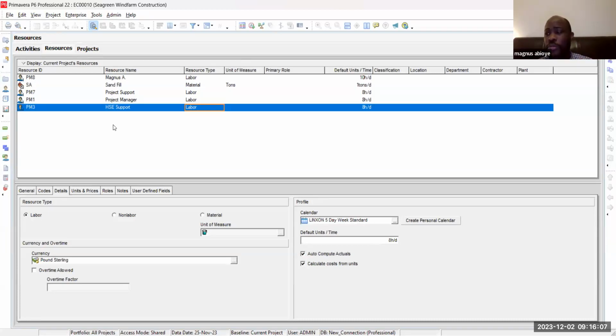If I just want to put costs, say 50,000 lump sum for this project, it's a lump sum irrespective of what you do, you're spending 50,000. So it doesn't belong to a particular person. That's more like a non-labor resource. Let me put that there so that you have an idea about it.